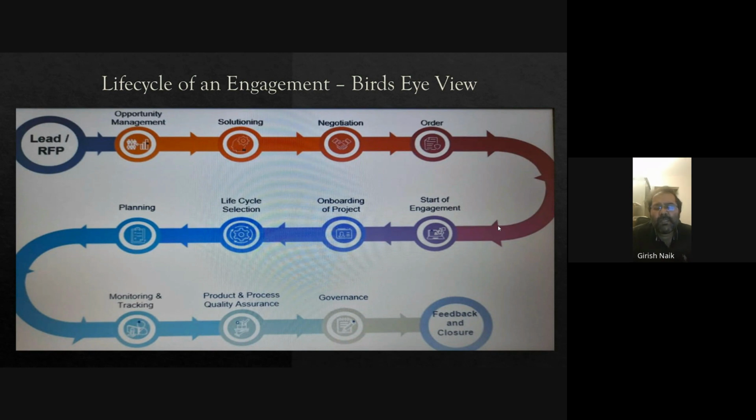When you analyze maybe the last 3 months of data, if you are getting the majority of the review defects as cosmetic defects, right? All comments are cosmetic comments, right? Then there is some problem where the review is not that effective, and we may have to re-review with the proper subject matter expert. That's what it tells, right?